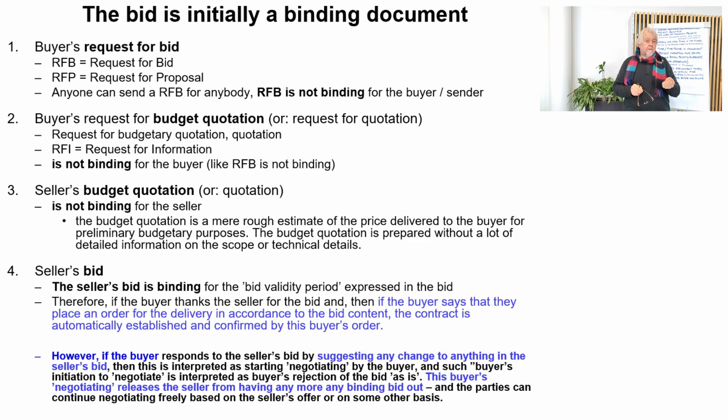So you must think, if you are a seller and you send out documents that are called bids, you must carefully think about what you write in them, because if it happens that the buyer buys as is, then the contract is there.